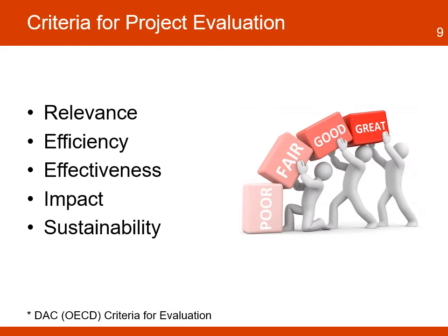An important consideration before starting an evaluation is to have a good understanding of the factors that determine the success of an evaluation. When planning an evaluation, the project and the organization will need to consider the following criteria. Relevance. Was the project a good idea given the situation to improve? Was the logic of the project correct? Efficiency. Have the resources been used in the best possible way? Effectiveness. Have the planned results been achieved? Did the project deliver the expected results?